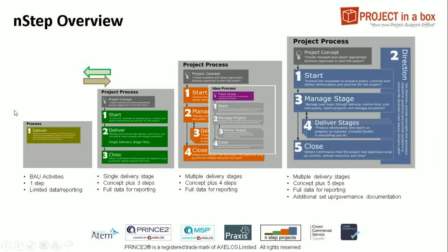But it's to allow organizations that run a demand process to match that in the system. You could do the same sort of thing for the other methods. We've done it for the 4-step method off the shelf because in practice that's the one most commonly used, and it's the most flexible one, because you could run it with just one delivery stage and essentially be running something very much like a 3-step, or you could add in extra documentation and be running it very much more like a 5-step. So it fits that boundary very nicely.